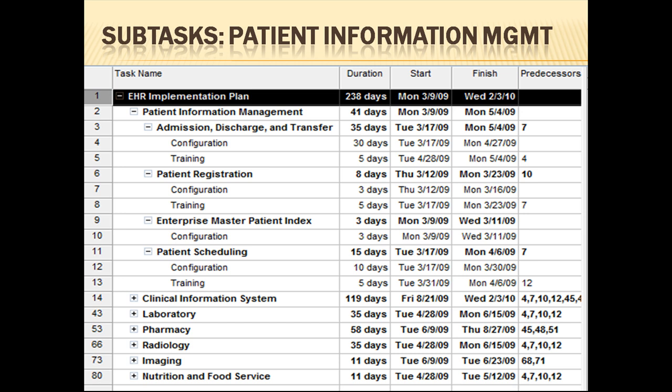When a task is dependent on more than one predecessor, you can separate them by commas and the software will automatically determine which dependent task has the latest completion date and will start the new task after that date. Here we can see the different subtasks for patient information management. These include Admission, Discharge and Transfer, Patient Registration, Enterprise Master Patient Index, and Patient Scheduling.